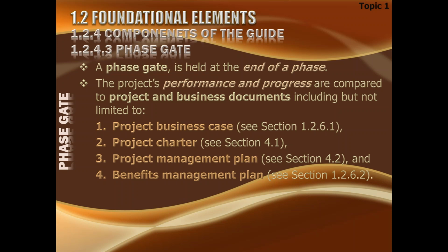But behind the project management plan, there is another bigger plan, which is called the benefits management plan. And that is not created by the project manager, that is created by the business analyst. So it is created beside the business case. The benefits management plan covers the product of this project, how it will be used and sustained in the long run, and how it will yield the benefits, how and when these benefits are to be realized. This is the benefits management plan. So the benefits management plan is a bigger plan, and it is created outside of the project management.